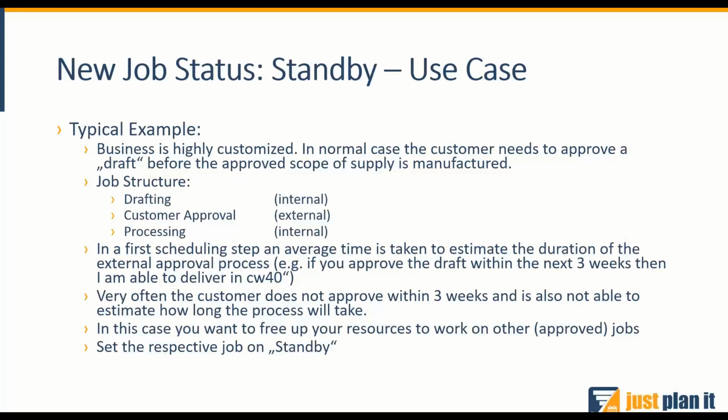And since you don't know when you will ever get this customer approval, you do not know where to put the remaining task, the actual processing, back to. So you actually say, okay, I don't want to blockade my resources at all. I do not want any of the leftover tasks to be scheduled. And that is where you set the respective job on standby.